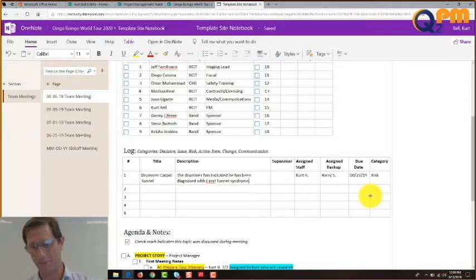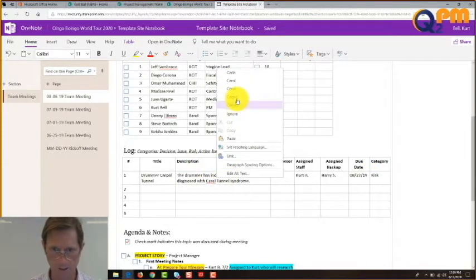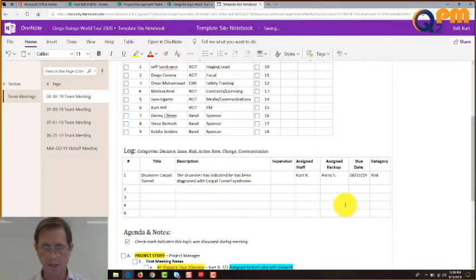Harry's going to back me up. I'm setting a goal for myself to have this risk addressed in some way, remediated, accepted, or avoided by the 27th. That's 2 weeks out. How's that sound to everybody? Carpal spelled wrong. It is? Oh yeah, yes, thank you. Carpal, there we go, thank you. So good, we're in good shape, and I'll go ahead and put in my supervisor as well, because hey, now we know who to go to if I'm dragging my heels.